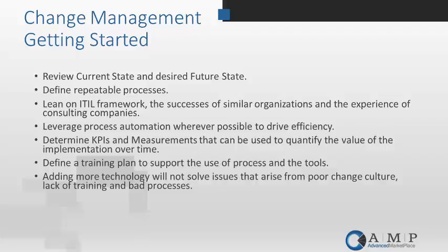Define your repeatable processes. As both a process consultant and a technical consultant, this is an extremely important one. When you get into defining both your process and your tool, if you focus on the things that happen 20% of the time instead of the 80% of the time, it takes a lot longer to get out of the gate, and it seems to make your system a lot more complex. So those things that you know are repeatable and happen, focus on that 80%. And then the 20% can be a phase 2 or a phase 3 if they're not critical items.